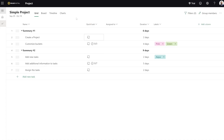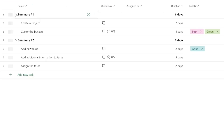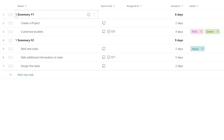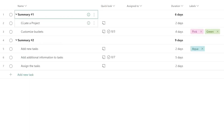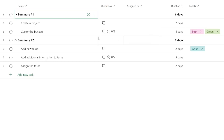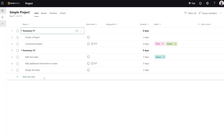So what that template does is bring in a few very basic tasks for me automatically that I can get started with. Really quickly, it came right up. We've got all my tasks listed and, as you can see, we've got summary tasks — these aren't actually tasks, they're just summary items. And then we've got tasks down below which have name, who it's assigned to, duration, and labels. From this screen I can create tasks, edit tasks, and move tasks around.